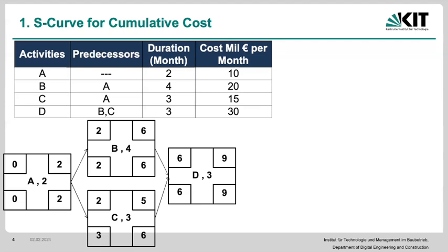That means that the earliest time it could start, which is the left side here, at the top, and the latest time it could start are the same. The same on the other side here: the latest time this activity can finish versus the earliest time this activity can finish. If either one of these is the same, and we only need one of them to be the same, because the other is just plus the duration, then we know that activity is on the critical path.